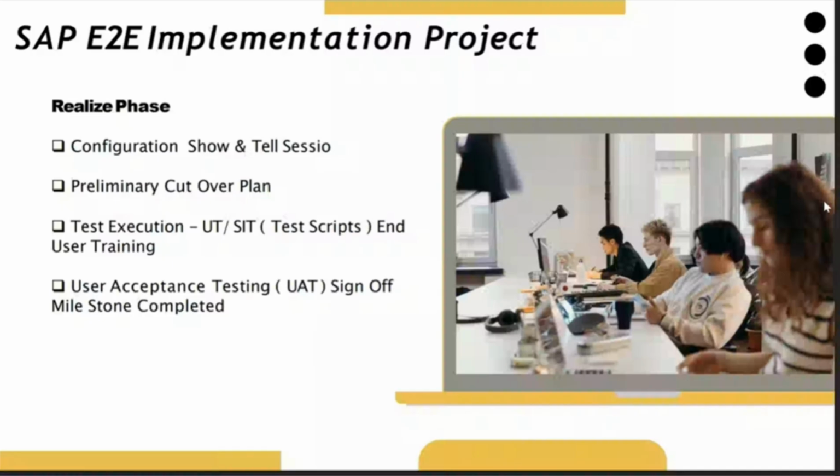So show and tell. Customer, you gave the Fit to Standard workshop, you did the BPD, blueprint and everything. Now you are doing some configuration, right? The customer has to know whether you are on the right track or going your own way. You are doing the configurations, so they will ask you, just show me whatever you configured, whether you covered our process or not. Now you are a consultant. You have to showcase the process to the customer, and the customer will give feedback.